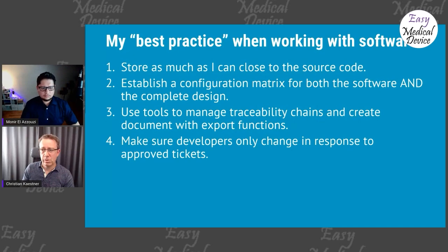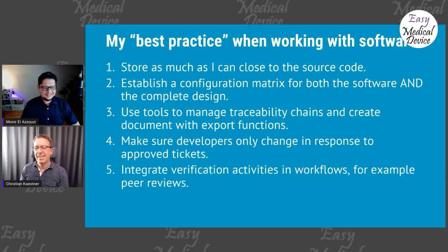Make sure developers only change the source code in response to approved tickets. I haven't talked about that, but if I work as a project manager, I never allow people to change anything in the source code unless there's a valid, approved ticket to do that. Because otherwise the shit hits the fan. Sorry for being brutal.